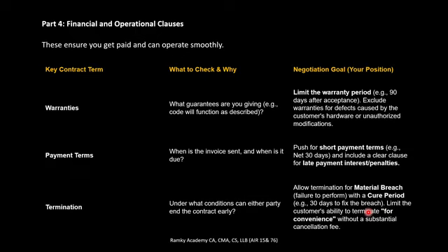If the software does not meet the customer requirement, then he can terminate. That is called termination for breach. So there will be penalties, because the customer says that I asked for a certain kind of software, you could not deliver it, and I have a right to terminate without paying anything.